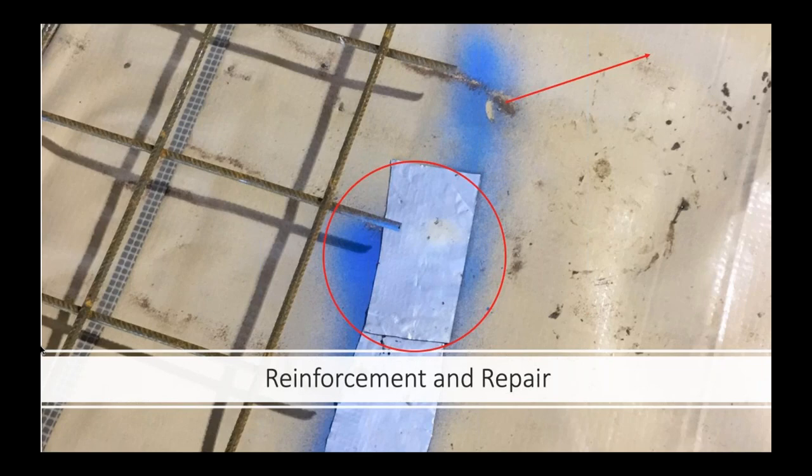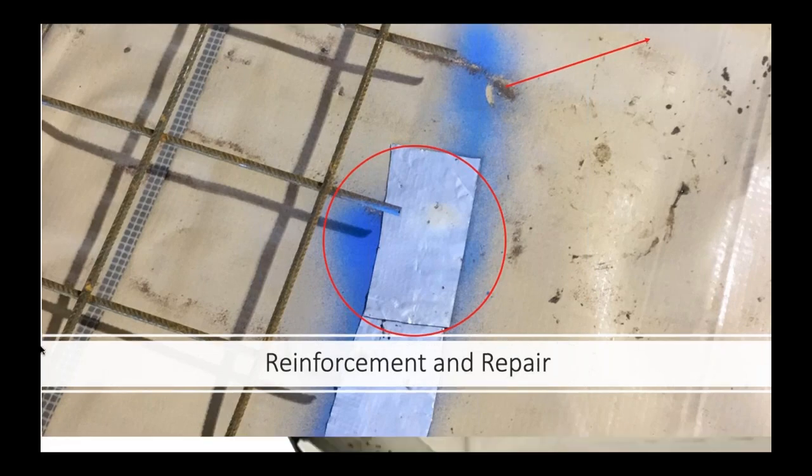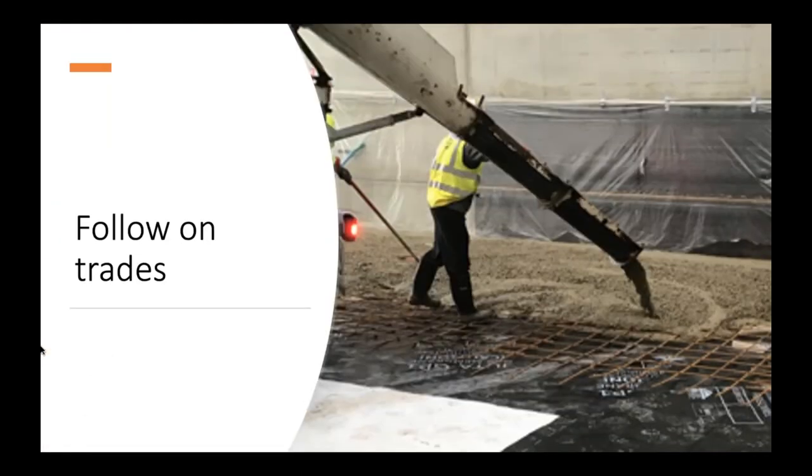Reinforcement, especially the weak stuff — you stand on it and some ends are pointed up, some pointed down and they just go straight through the membrane. What also happens is someone with a still saw fires along cutting all the ends off, thinking he's doing a good job, and he's actually burning holes in all the membranes as he goes. There's a lot to be aware of with follow-on trades.